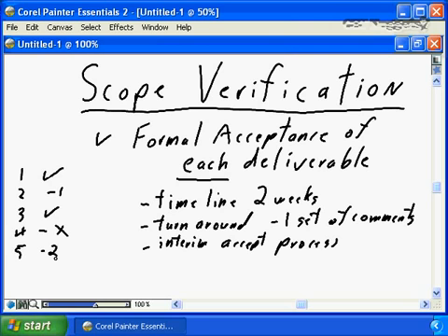So our interim acceptance process is saying chapter number 1 is accepted. It's not open for further revision. If you have second thoughts, if on a second review or a third review you want to change section number 1, it's literally too late. If you need to make changes after it's accepted, we'll deal with that with the next part in this nugget, which is change management. The same applies for section number 3. It is reviewed and it is accepted as is. Your team goes away and makes the revisions. You make the minor change to section number 2. You rewrite section number 4, and you make the 2 minor changes to section number 5, and you resubmit.